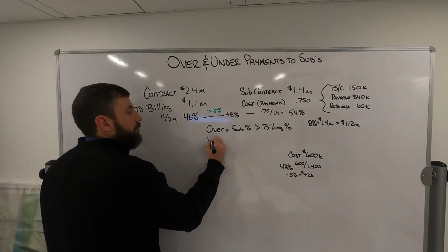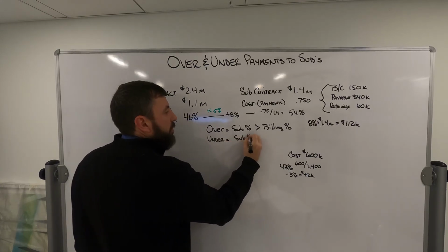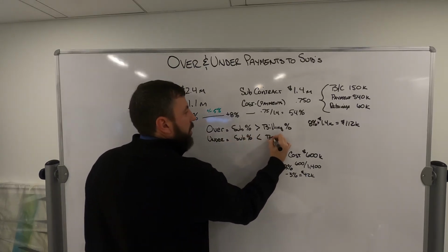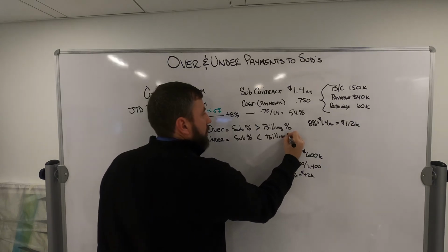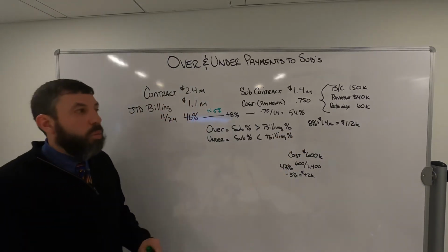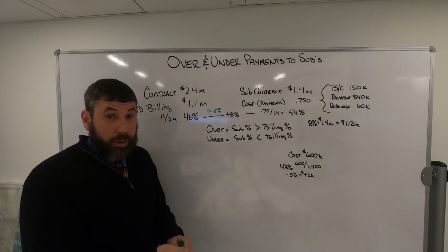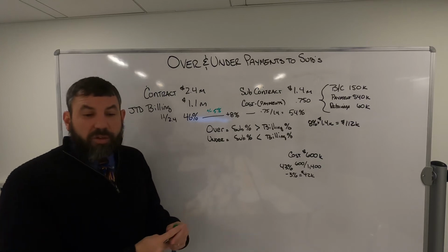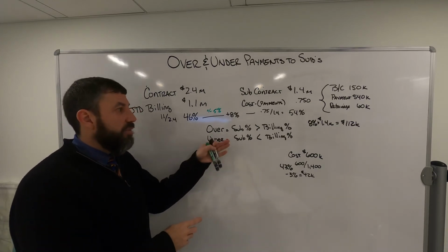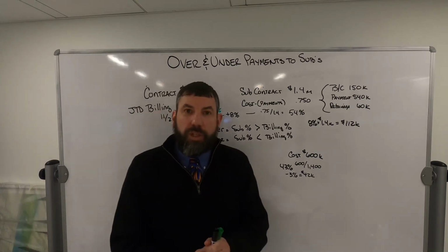So underpayment is when the sub percentage is less than the billing percentage. Each of these things are worrying. Why are we at this point that you want to question? Underbilling doesn't necessarily mean good. Overbilling doesn't necessarily mean bad. But when you identify these easily, that's when you take the connection to figure out why, what's driving into it.